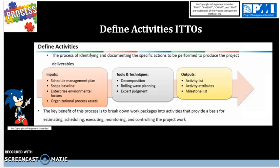Another output is Activity Attributes — the descriptive components of each activity in the activity list. This could include activity codes, predecessor activities, successor activities, logical relationships, leads and lags, resource requirements, imposed dates, constraints, assumptions, and also risks. This ties into the scope statement because risks, assumptions, and constraints are all part of the activity attributes.